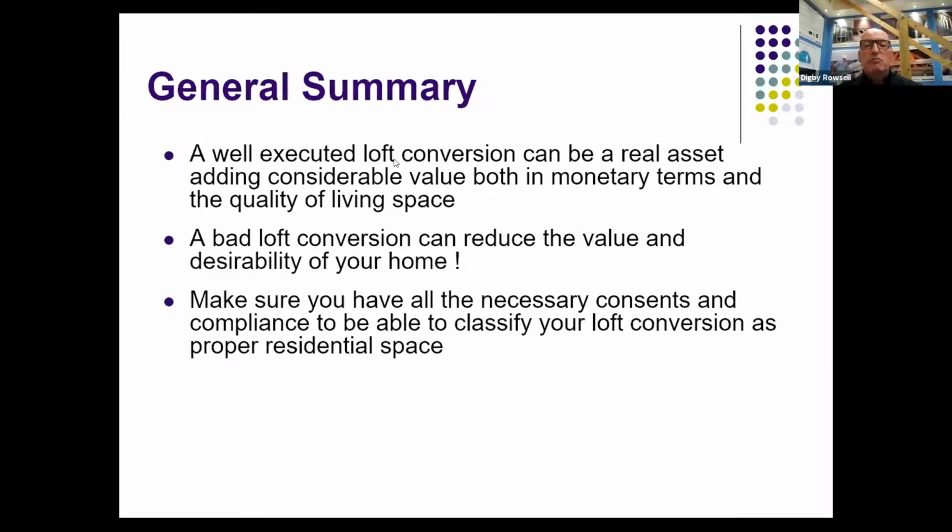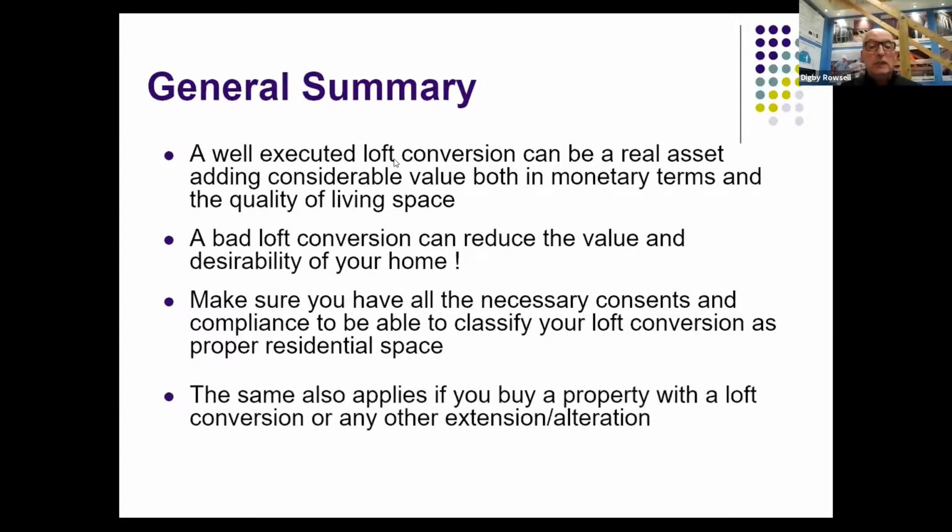If you're doing a conversion, make sure you've got all the necessary consents in place. When you come to sell the house, you want to be able to sell that space as proper residential space. The same applies if you buy a property with a loft conversion. Make sure it's got all of the permissions and ideally a completion certificate from building control saying everything complies.